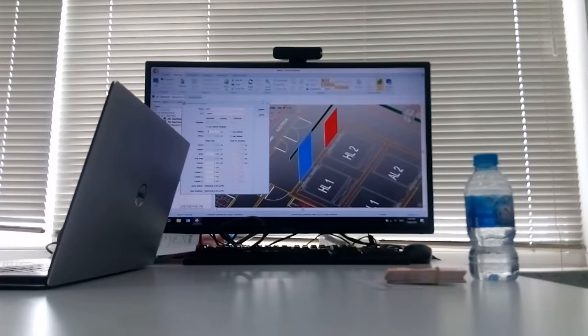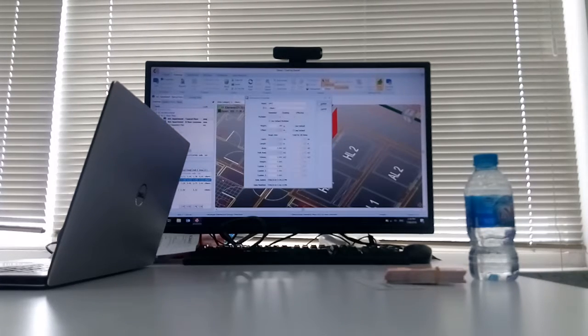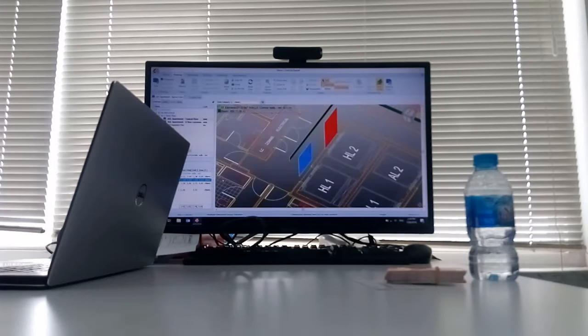Let's say I put it 1.5. Then if I never adjust the offset, it will be lower down. But if you want a better view and a clearer picture, you can adjust the offset to 0.5 and update it, then you can move it up. It looks like a designer's update. That's why I mentioned the offset is not necessary, because the offset will never affect your quantity.